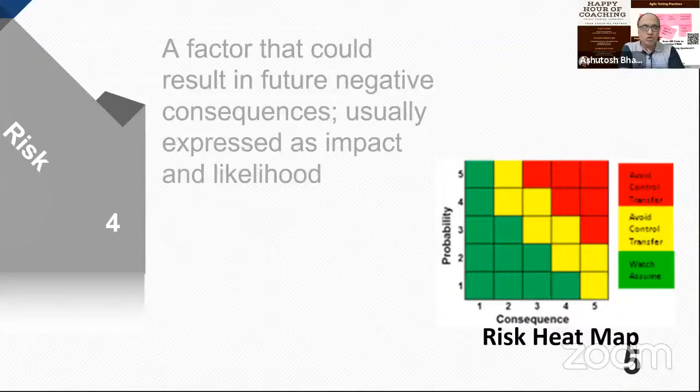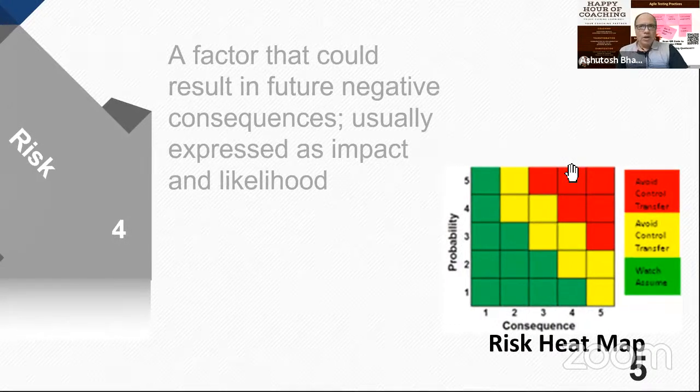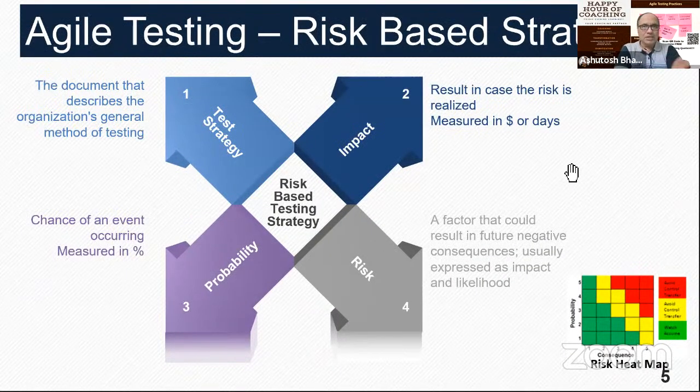Again, I'm not saying that you should completely skip testing. Please don't get the impression that I'm recommending that. But let's say out of 100 test cases to be executed in a sprint, maybe 80 you will keep in the red zone, 15 in the yellow zone, and 5 for the green zone. That's what I'm trying to hint here. We are not saying that we will completely skip the green zone test cases. That would fundamentally be a risky strategy for risk-based testing itself.